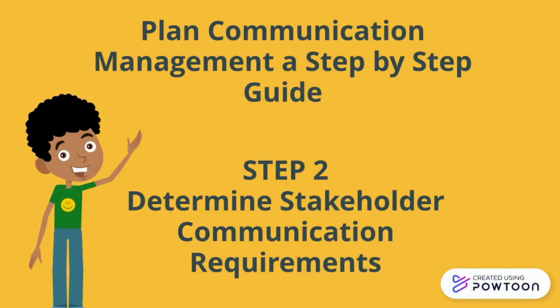First, you must ensure all stakeholders are identified. Many projects fail to do this only to discover it later, which results in project gaps, document changes, etc. Another key part of this step is determining all of the stakeholders' expectations, interest, and influence within the project. If a stakeholder's expectation is that this project should not result in any changes to his or her work, but you know it will, then this is where discrepancies like this must be identified and resolved.